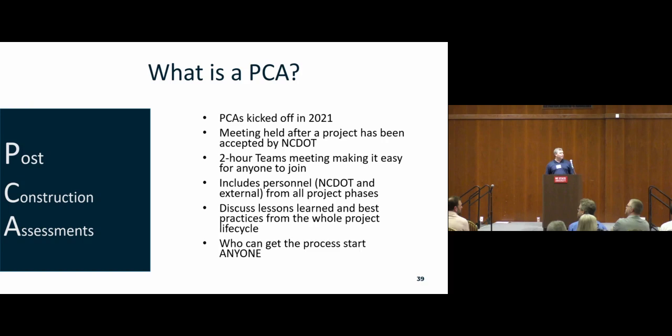They're held after we've basically closed out the job. It's about a 2-hour Teams meeting generally, to make it easy for anyone to make it, depending on where they're at, if the designers are not in the area where the project was. It includes personnel, NCDOT, and external, from all project phases.